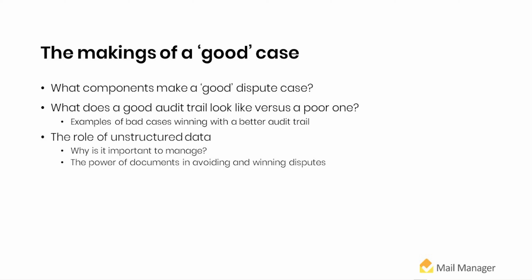So I think those are in some ways the main components, but looking on a wider basis, using the right technology to compile your records over the course of a project, but as soon as you have a dispute, using the right technology and the right tools to compile what you need to put together evidence. And that's not just records like emails, that's also things like using, say, a 4D model.